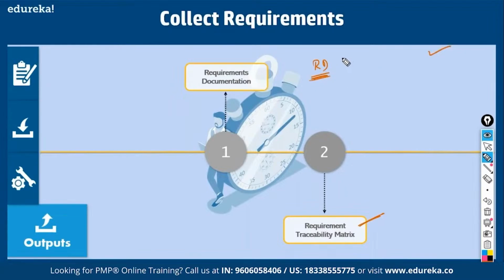So you have to cite all the requirements, 1, 2, 3, 4. And then he'll say, what are the mappings for these requirements? For that, you have what is called a requirement traceability matrix. You have to map the requirements to the high-level business need, that is, you want to be the market leader. Then you may have to map this to architecture drawings, then database procedures.